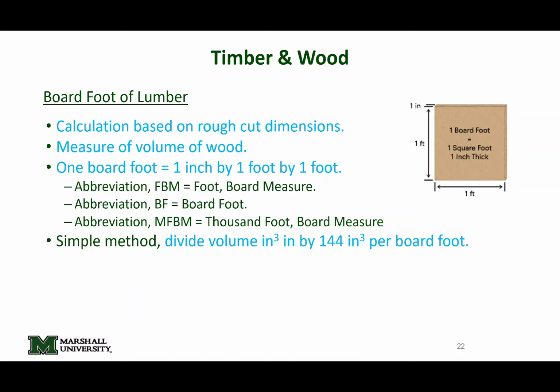There are a couple of notes worth mentioning with board foot computations. Probably the biggest one is that for products where T is less than 1 inch, use T as 1 inch for board foot calculations.